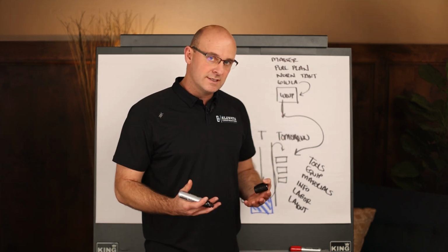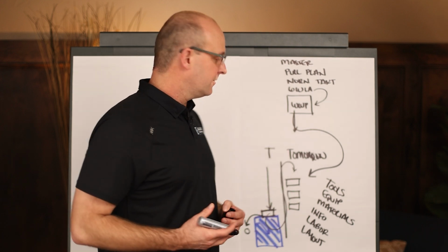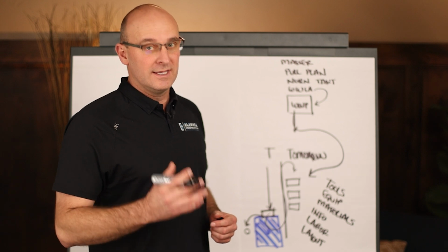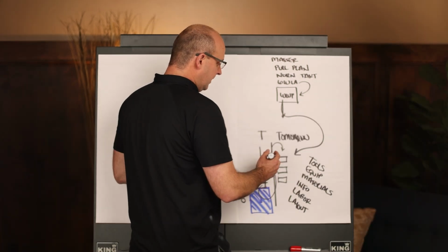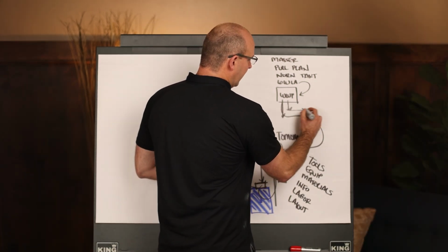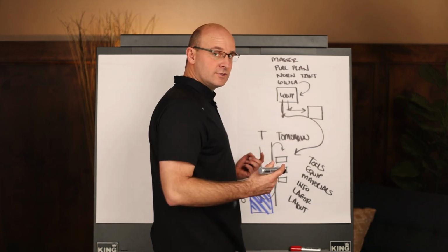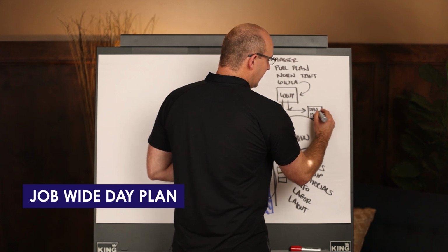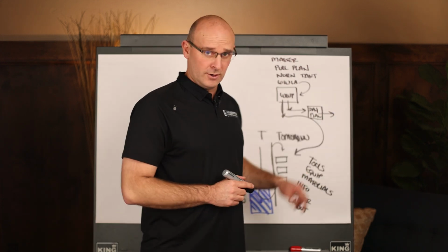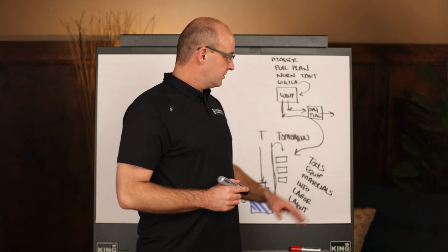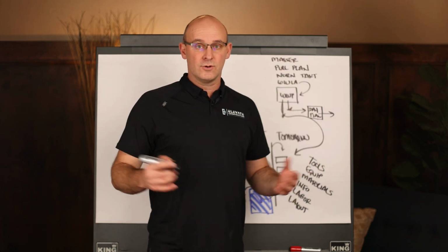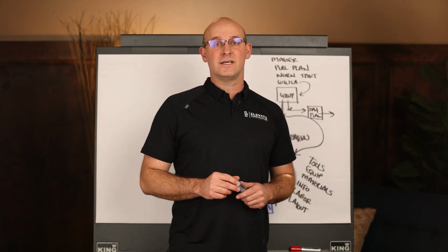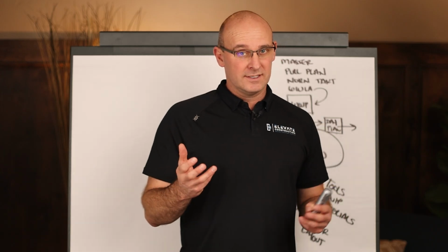But if you do this kind of day planning, this will be very effective for you and your crews, and you'll be able to do most of your production in the most productive time in the day. Now, if the general contractor is doing a good job, whatever was coordinated and decided upon as a group that the whole job site needs to know will go on what's called a job-wide day plan, and that should be sent out either through a QR code or by email or by WhatsApp message to all of the job sites so that any large coordination items can be sent out to your people. So that, in addition to your planning, should set you up nicely for your day. And so I'm really excited about this for you and for me.